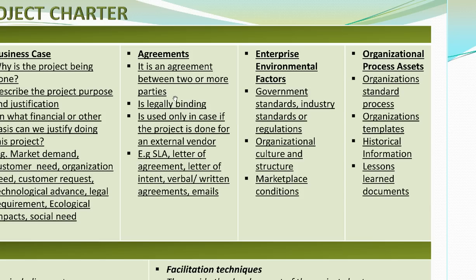It is used only in case the project is done for an external vendor. So for example, if the project is within the company, then we really don't need the agreement. But the second the project is for a customer that's outside of the company, then yes, you will need an agreement. Now an agreement can be of different forms.